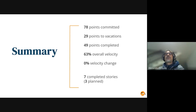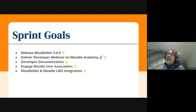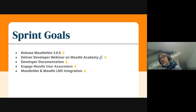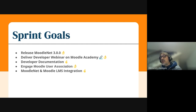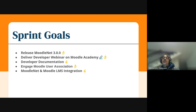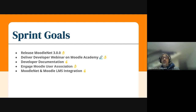We have five sprint goals: to release Mudanet 3.0, to deliver a developer webinar on Moodle Academy, to produce developer documentation, to engage the Moodle User Association, and we also have a work-in-progress job for the Moodle LMS integration with the Moodle LMS team.